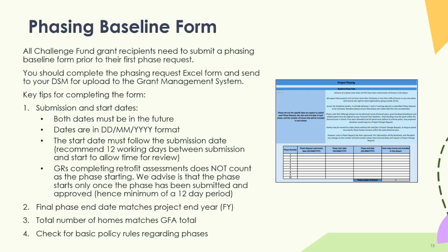So this is an opportunity for you to re-evaluate what you'd initially put in your bid or GFAs and say, okay, this is more reasonable in terms of our delivery, and changes can be made without having to go through the project change control process. If you are in a position where you're looking to de-scope, etc. for year one, obviously that does need to go through that process. But just to move homes around, add some more phases, etc., that is allowable within this process.